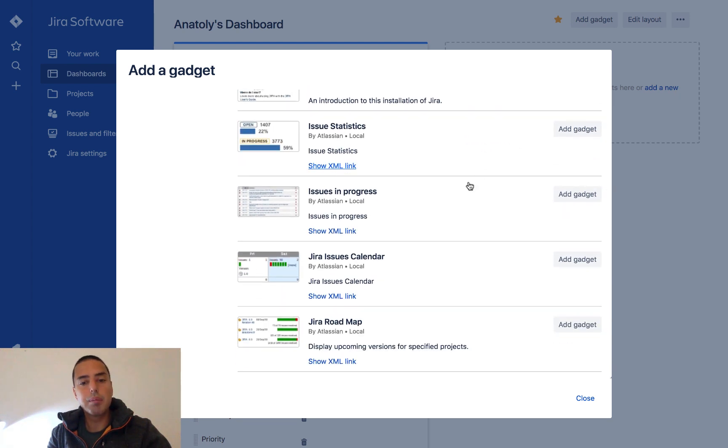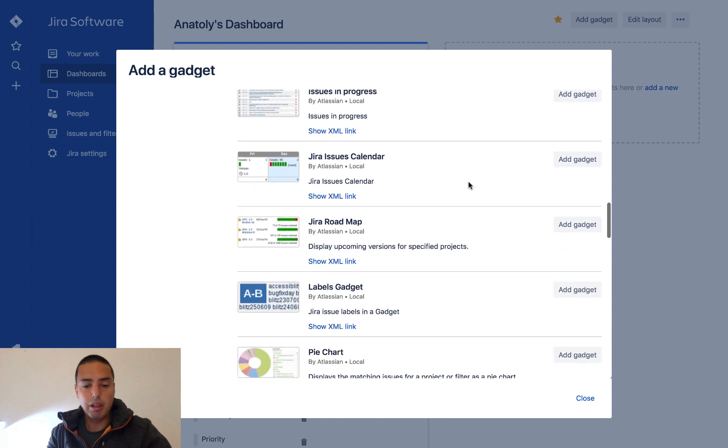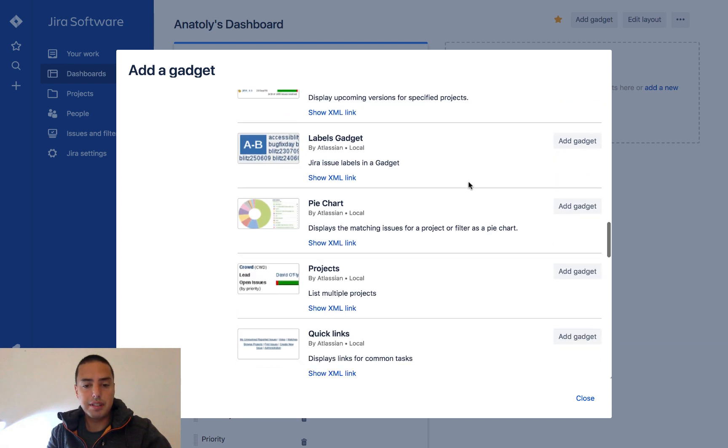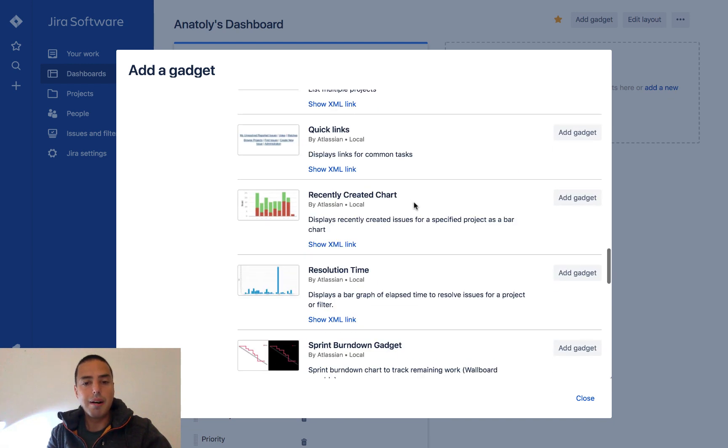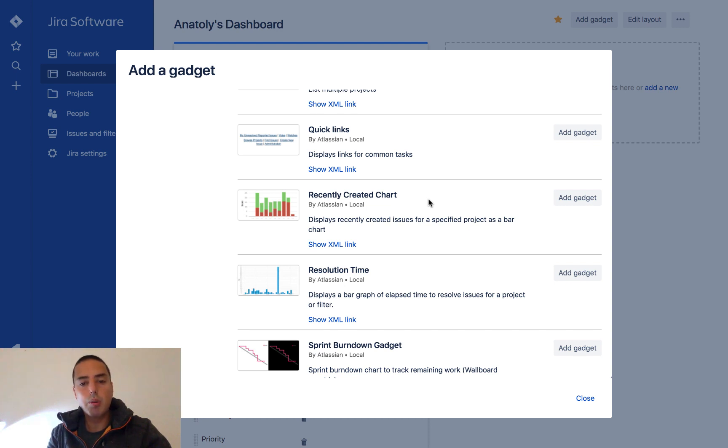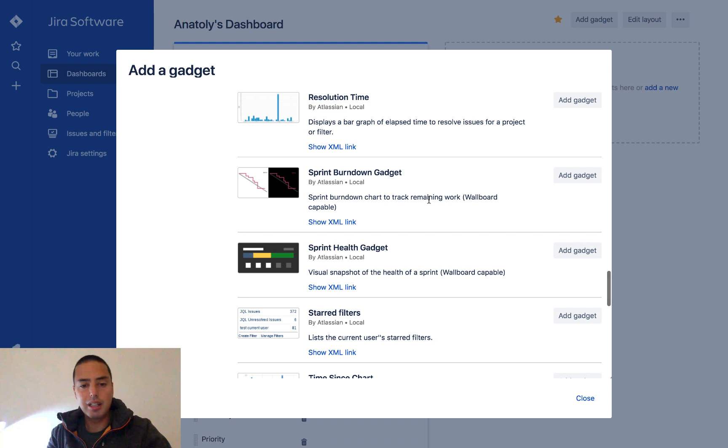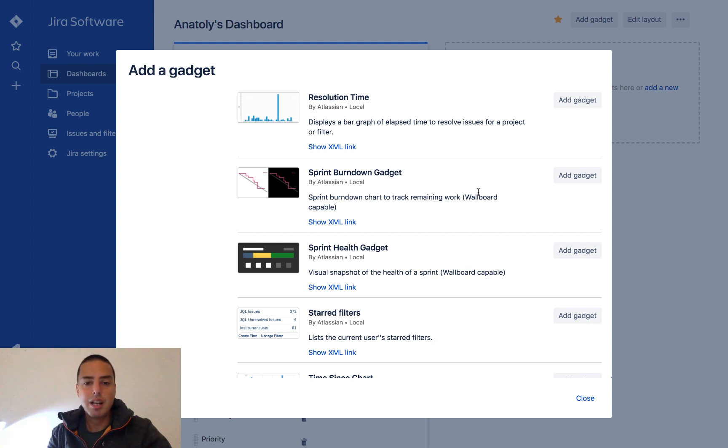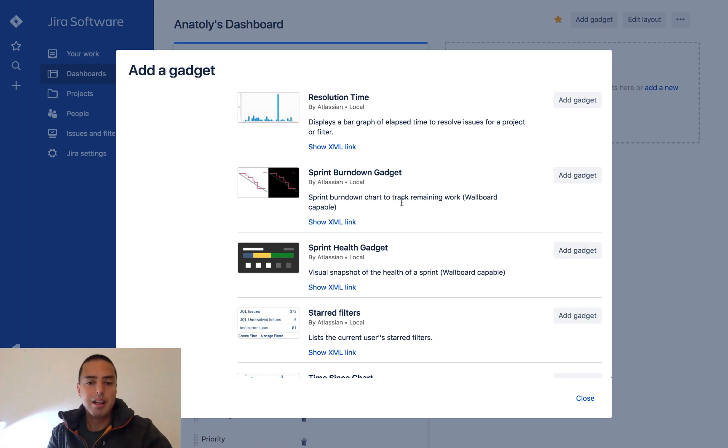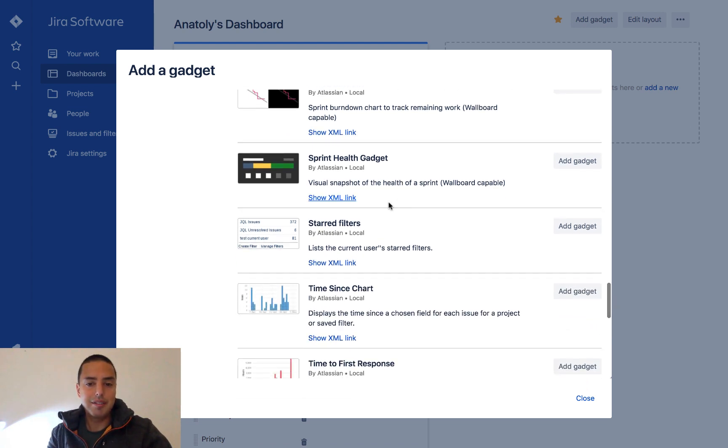But you can see there are lots of other things, lots of charts. It depends who you are. If you are a product owner you might want to have completed versus in progress, release burndown charts. If you're a scrum master you might want to have burndown charts and other things like sprint health gadgets.